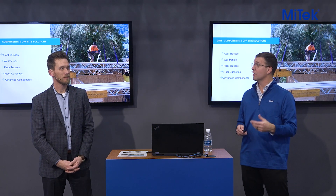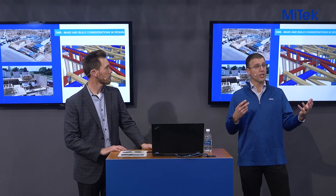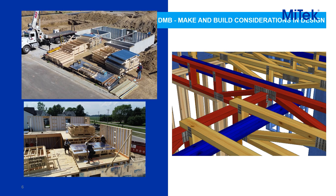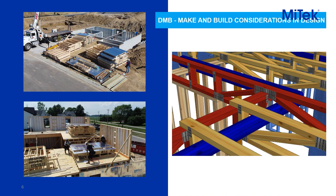Now we'll do a little quiz — we have a series of images and we want the audience to identify things from a design standpoint that need to be considered based on the components being used. This first photograph shows a relatively tight job site with foundations poured and wall panels and floor trusses staged on the job site. That is a massive advantage to using components — they can be built, delivered, and placed in a very specific location to help the framing crew put that building together.